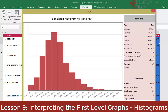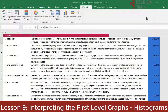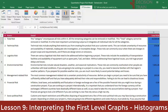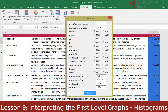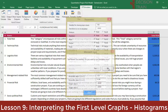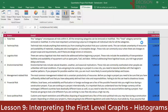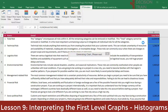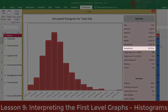Now, let us temporarily change the second percentile to 99 using the parameters icon on DT Simulator's ribbon. We would then observe that there is only a 1% probability that the risks are greater than about $25,800, proving once again the asymmetric nature of the distribution of total risks.